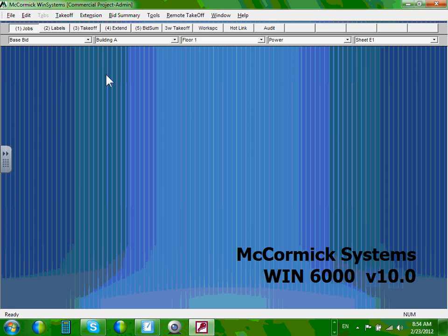And step number 5, the last one, is bid summary. Bid summary, guys, is where you take your extension and add the overhead and the labor to it. Remember that? Overhead and labor and profit and contractors, subcontractors, and all those guys. It adds them all up in one category. Can I have thumbs up that we understand this process is 5 steps? No more. All what you need to understand from it is really 5 steps. Cool? Thumbs up, Jackson, my friend. We're good?